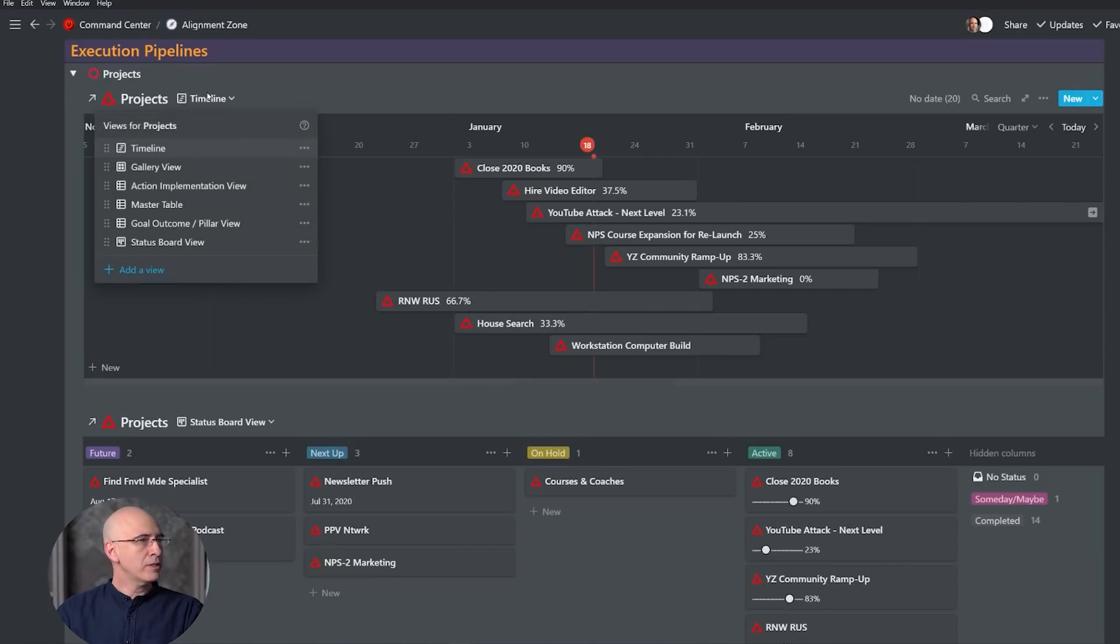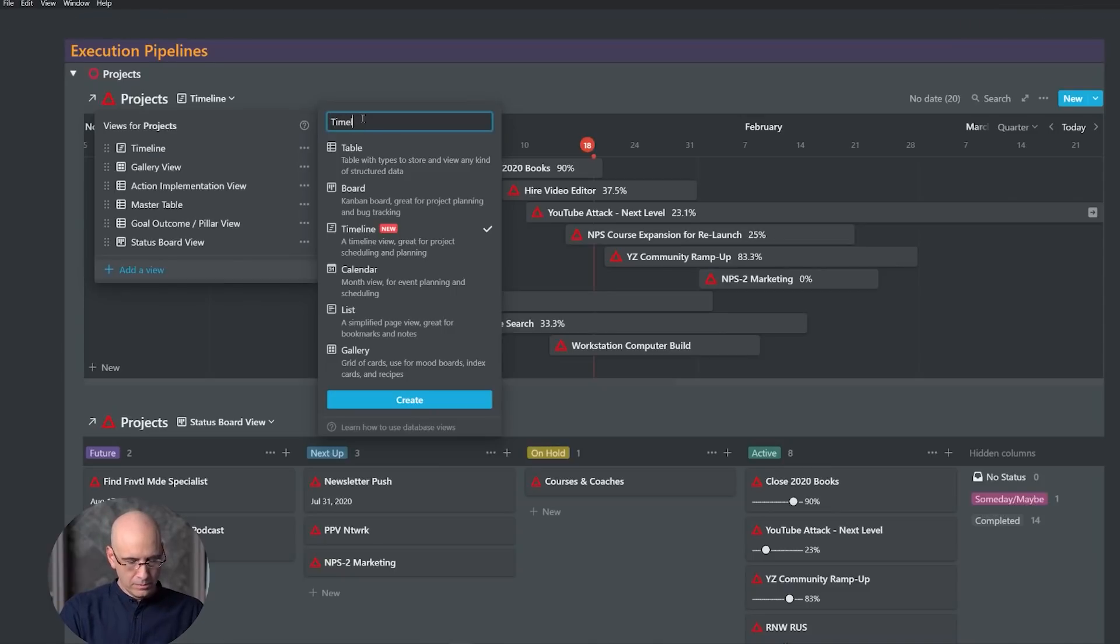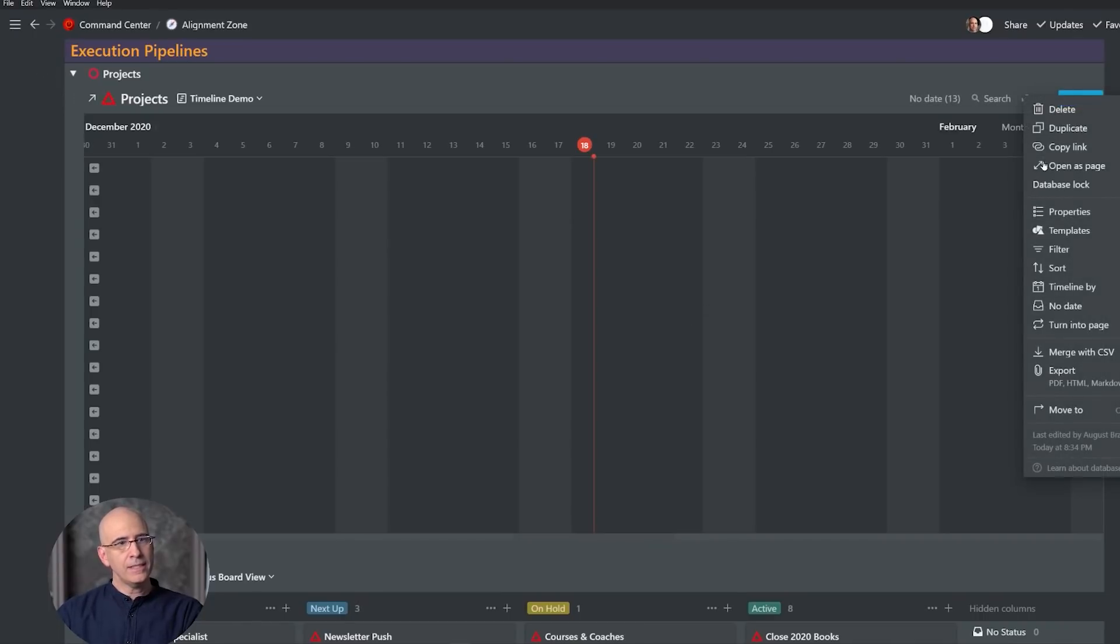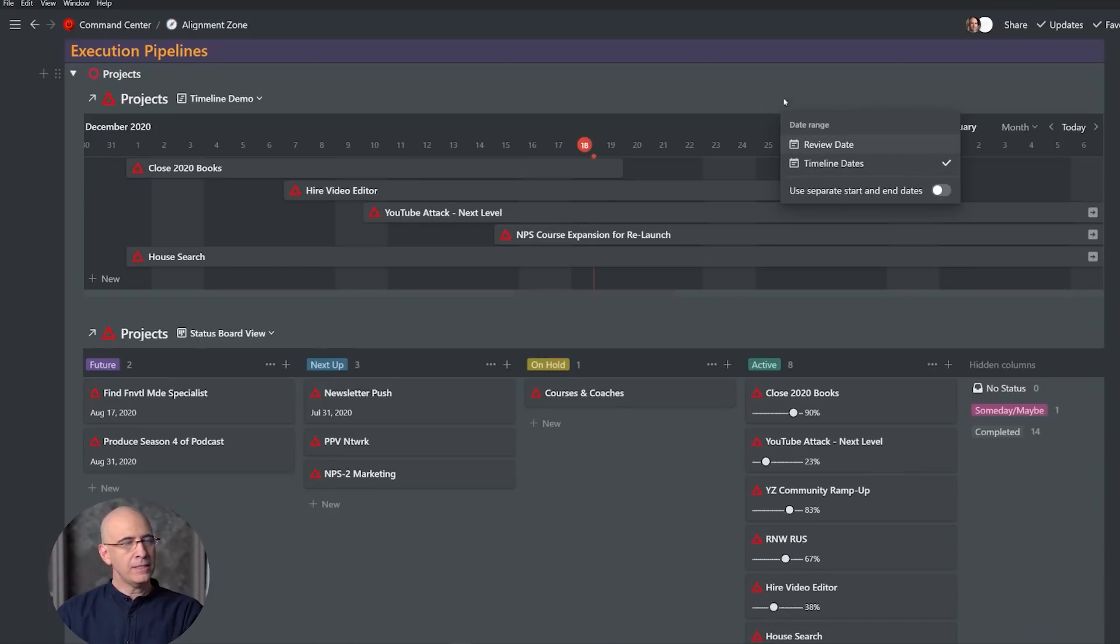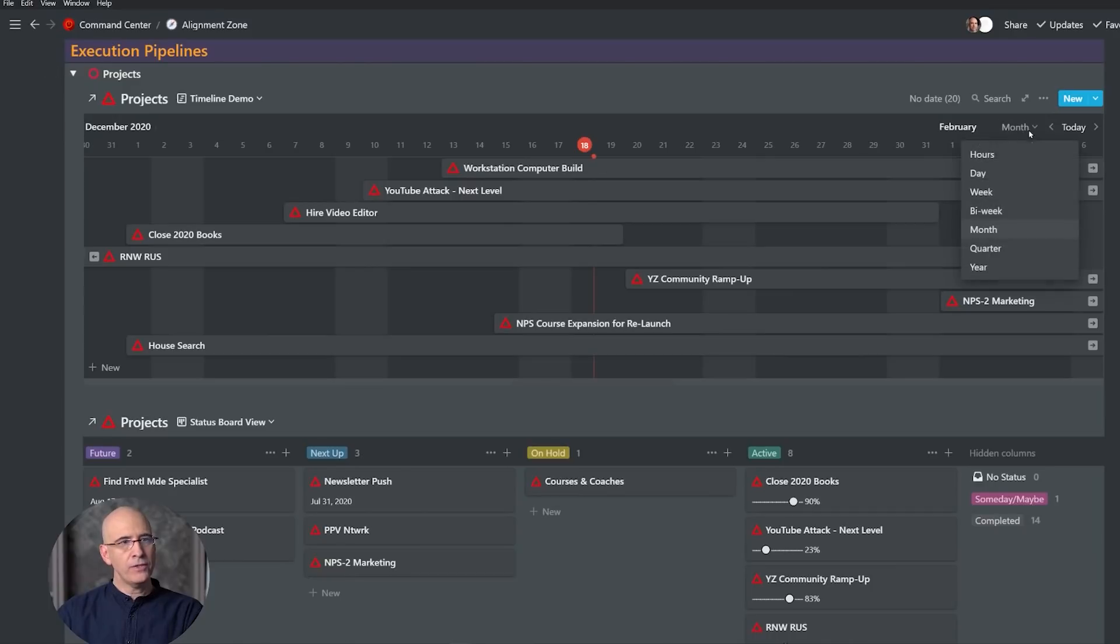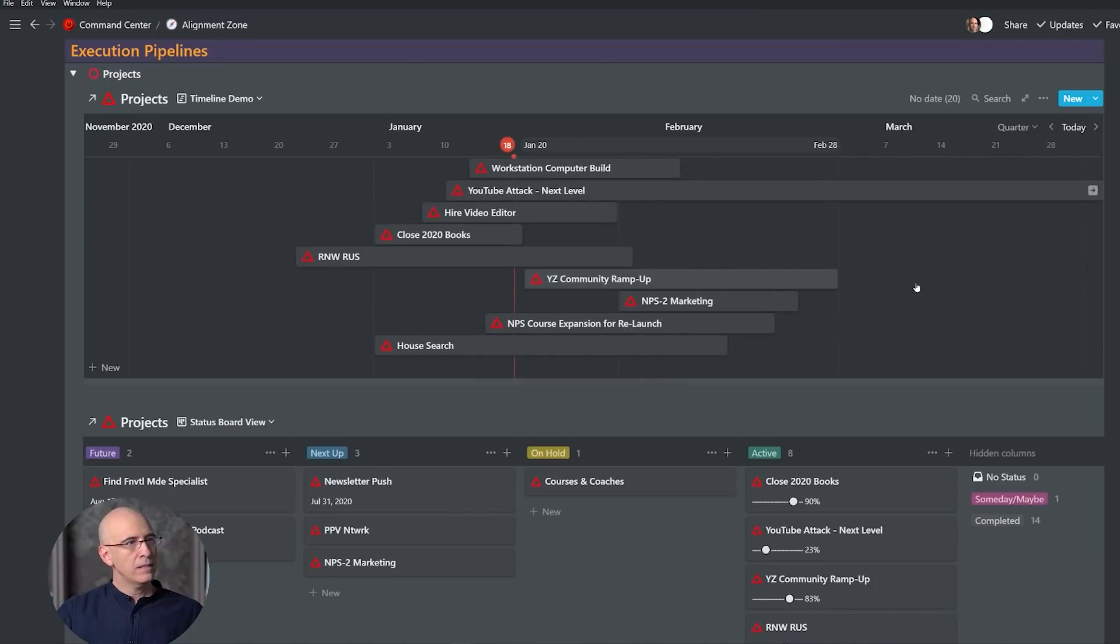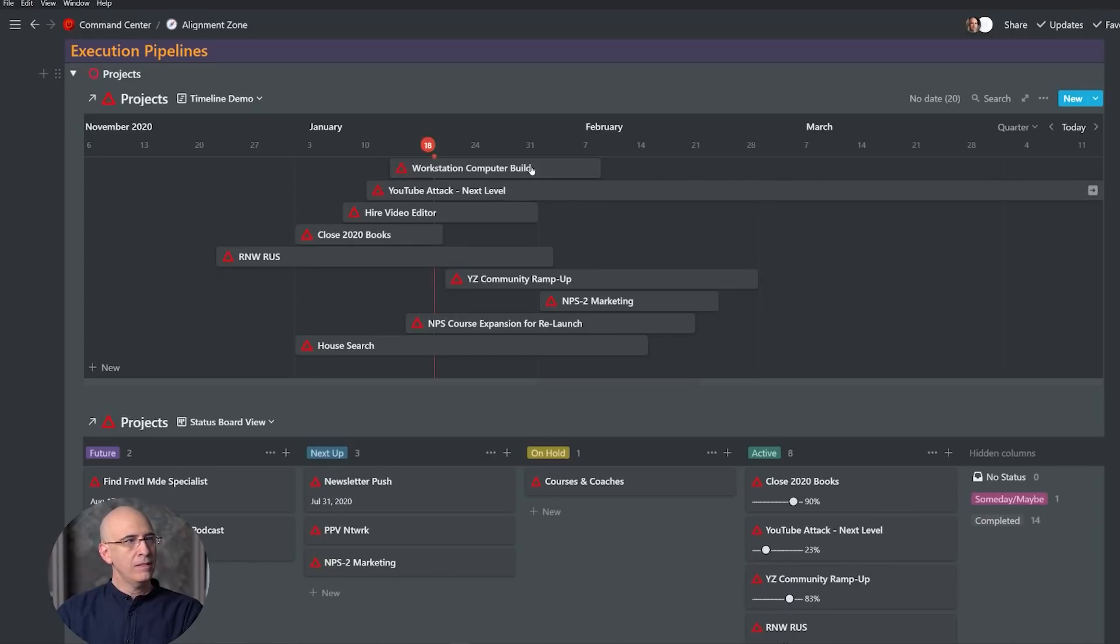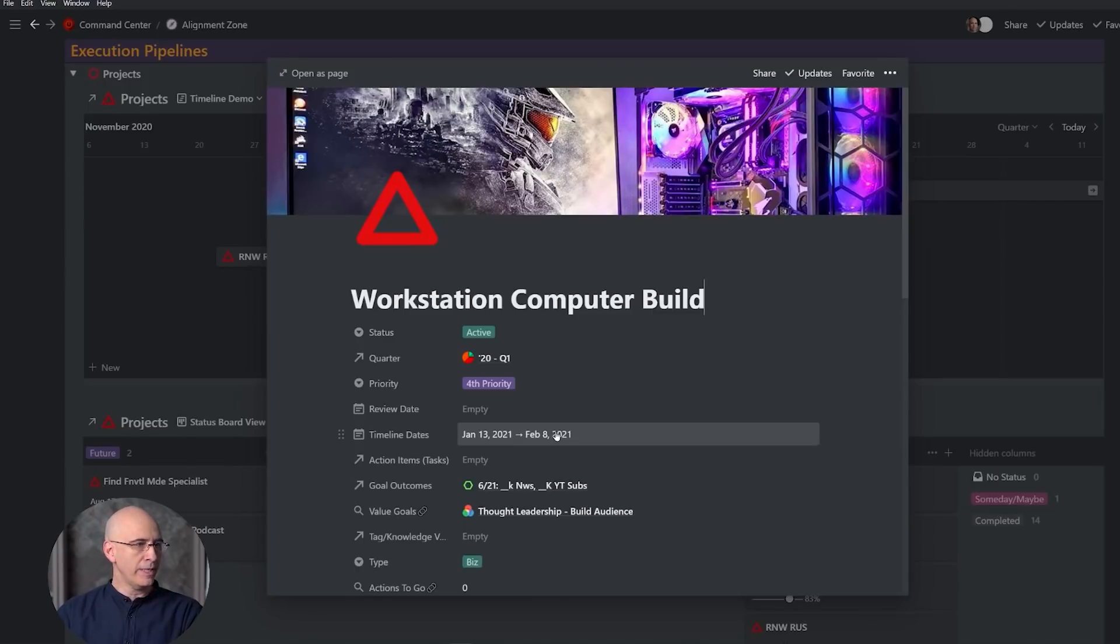So let me show you how to create this from scratch. All you have to do is click Timeline, click Add a View, choose the new timeline view, title it, and create it. It's going to give you a blank one. Now you need to first go and set the timeline by choosing Timeline Dates, and now it's going to lay it all out for you. By default it gave us a month view. We're going to jump out to a wider view so we can see it more clearly.